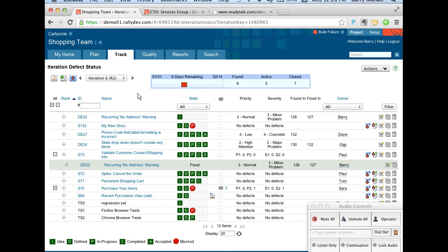There's another variable to that, which is whether you choose to estimate that defect or not. If you don't estimate the defect, then it's going to show a scope change. Correct. And I think we all agree that if it's part of the user story you're working on, you don't estimate it because that was estimated by the story. The issue is defaulting to the defect not being part of the sprint.